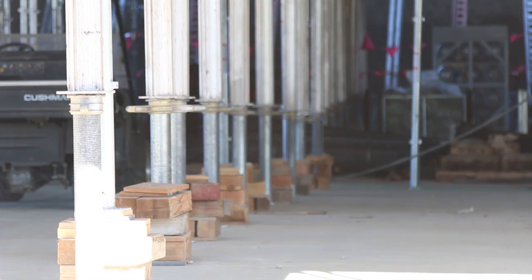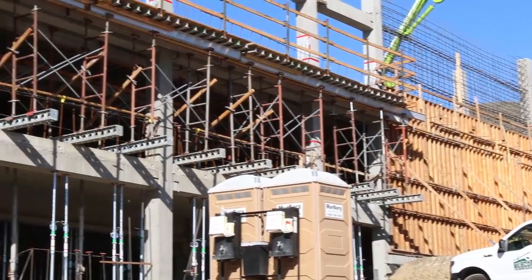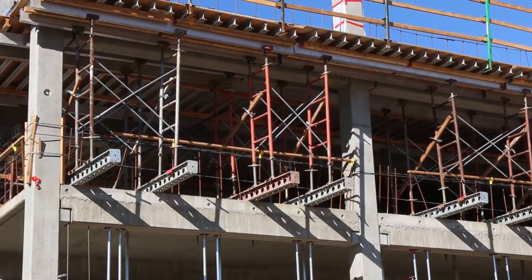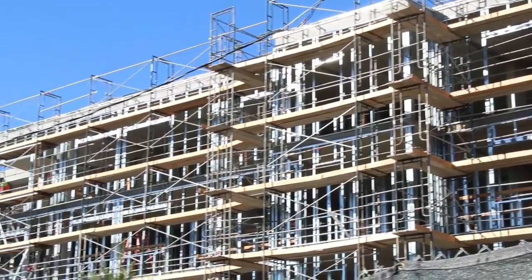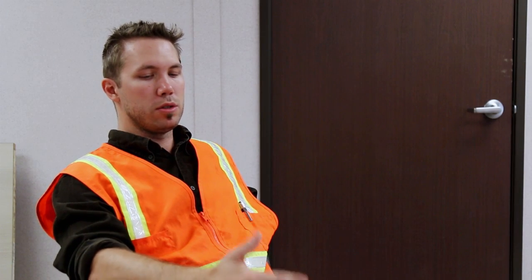We have a bunch of stuff depending on what's going on. We have this shoring system that Webcore Concrete is using. Right now it's mostly set up at the parking structure, and then we also use it for the dormitories. It's designed so that it can be adapted for use in the different buildings without having to redesign and re-engineer the shoring system. We just put up the scaffolding on the first dormitory building, building 4E, the 3-story building closest to Slack Street. Once we start building out the interiors, we're going to shrink wrap it to maintain the integrity of the interior so it doesn't get water damaged.